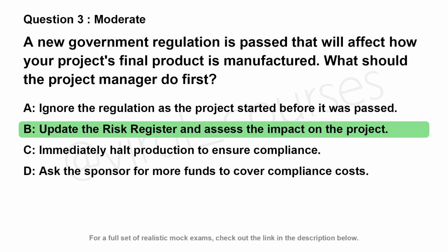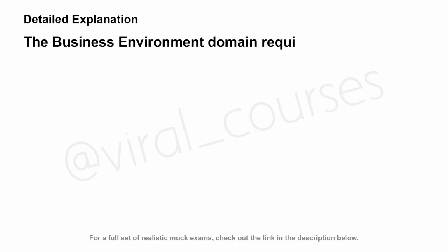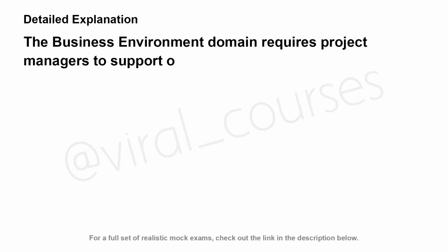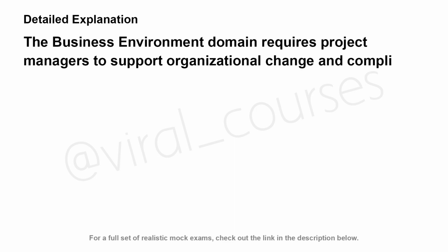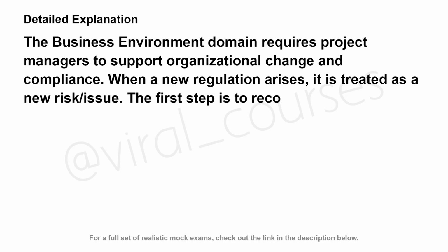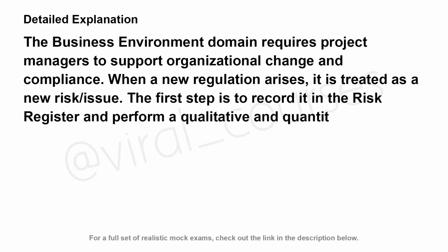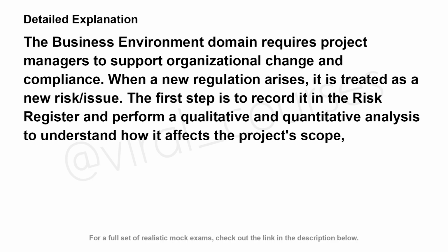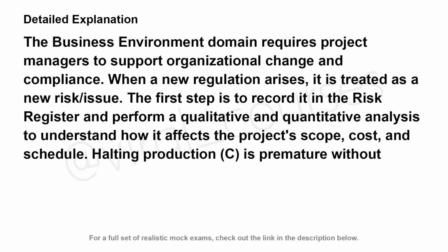The correct answer is B. The business environment domain requires project managers to support organizational change and compliance. When a new regulation arises, it is treated as a new risk issue. The first step is to record it in the risk register and perform a qualitative and quantitative analysis to understand how it affects the project's scope, cost, and schedule. Halting production, C, is premature without understanding the impact.